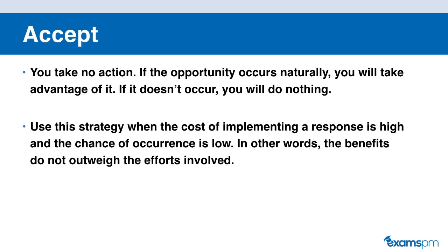Our next risk response strategy is accept. The accept risk response strategy can be used with both types of risk, positive or negative. Here, you're just taking no action, and if the positive risk or the opportunity occur, you will benefit from it. If it doesn't, you're not doing anything in order to realize it. So you will use this strategy when the cost of the response is high and there is small chance of it occurring, where the benefit just doesn't really outweigh the effort involved to make sure that it is realized.